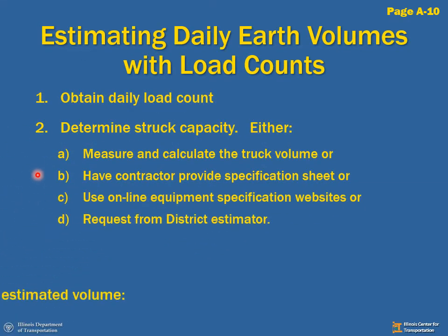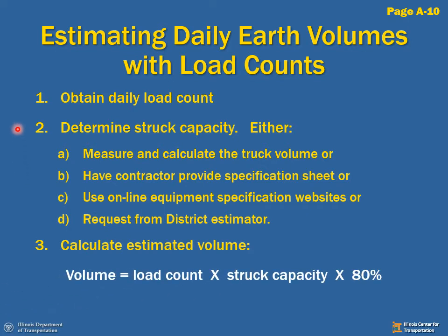Estimating daily earth volumes with load counts. We're on the job site. They're going to be working on earth volumes for maybe a couple of months, and we're going to agree to plan quantity, or we're going to work off of before and after final cross sections for our total quantities. So we need a method to estimate as we're performing this work. We can do it by counting the loads, using a capacity of each piece of equipment. Simply, it is the number of loads times the capacity, and we're going to use a conservative factor of 80%.